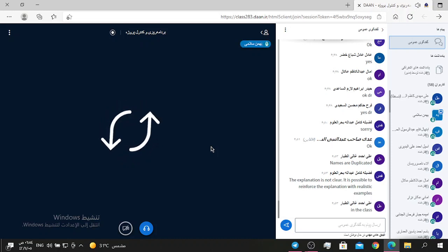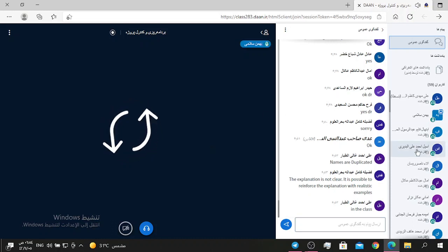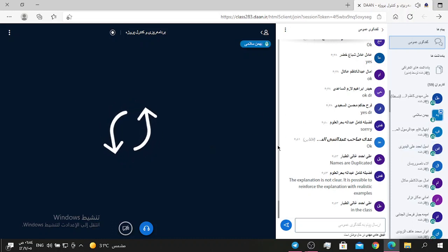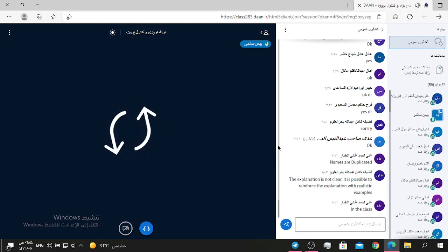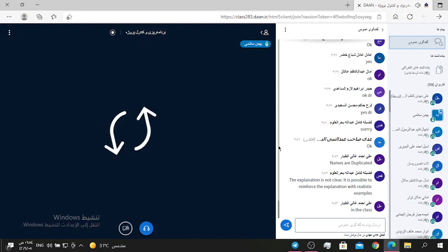Okay. Leads and lags. This is so important. Leads and lags for sequencing the activities. A lead is the amount of time a successor activity can be advanced with respect to the predecessor activity.